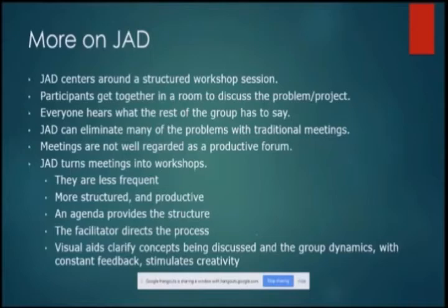The advantage of JAD includes a dramatic shortening of the time it takes to complete the project. It's as simple as that. When you are working on some project and you are informing the client at every stage, look, we have done this and we are now working on this, do the testing of this part. When I was working on the design phase of the project, when only the screens and layouts were designed, we were discussing the design and flow with the client. So the client has a complete overview of his project: this is how my project is going to look. Dramatically, this reduces the time it takes to complete the project.